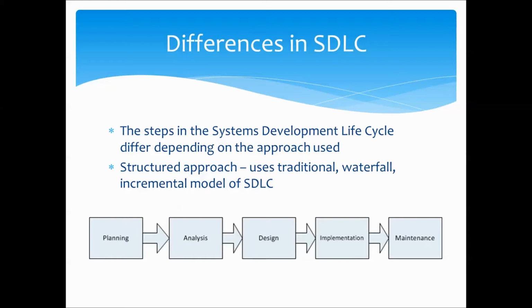This is a top-down approach, so things are done in a logical order. The business problem or opportunity is examined first, followed by project feasibility and requirements. Then requirements modeling, logical and physical design, implementation and maintenance. The models are derived from initially analyzing the business or organization, then decomposing the business into process models.